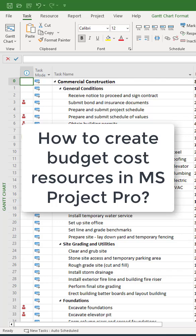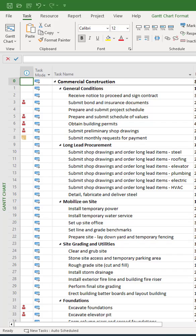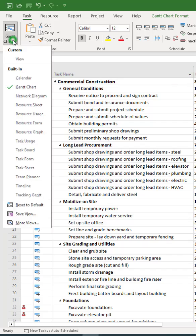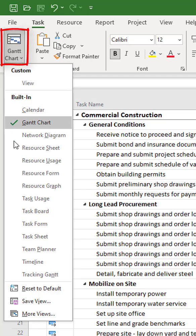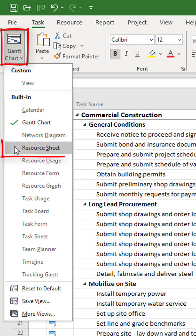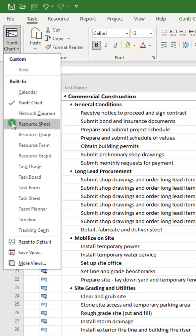How to create budget cost resources in Microsoft Project Pro. First of all, let's open the resource sheet view. Click the Gantt Chart button in the ribbon and select the Resource Sheet item.